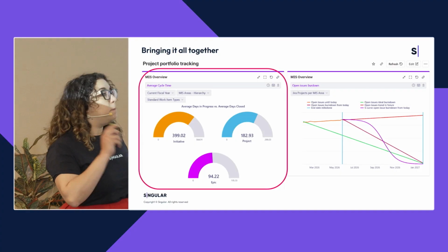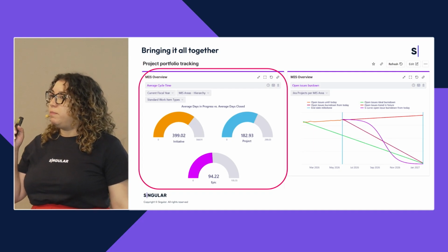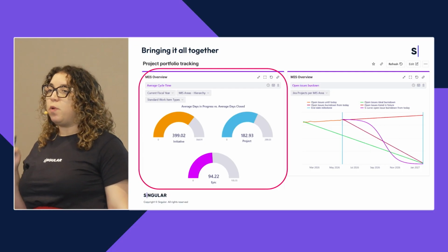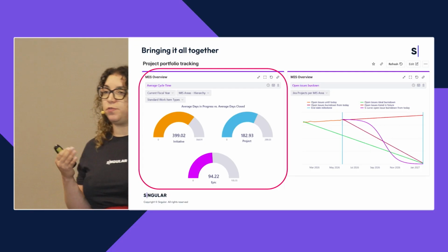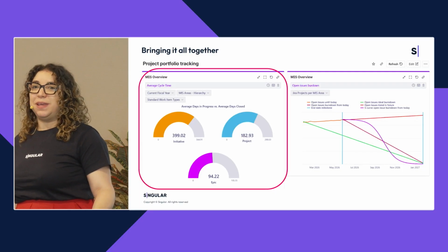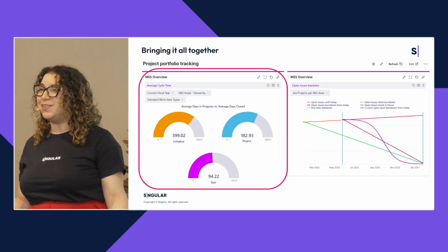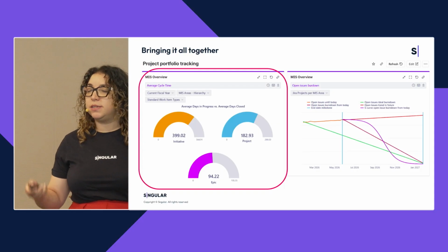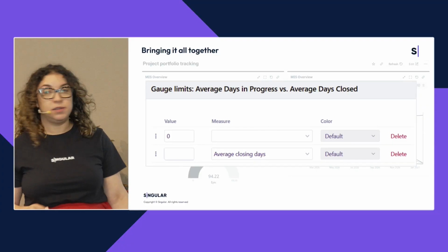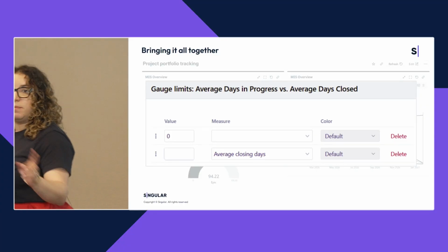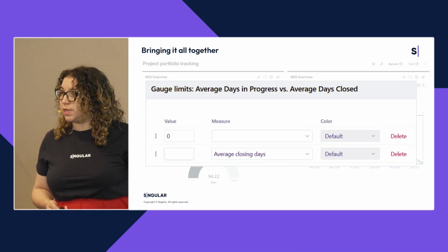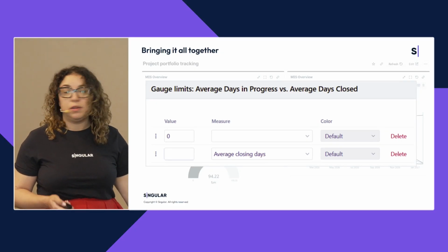And one of the things from Nimble Solutions, they mentioned yesterday, was that one of the big problems that you tend to have, especially for Jira workflows, is that you don't have a resolution date. Because people forget to add a resolution when they close a ticket, right? But we found out eazyBI counts with the average closing date. So with the average closing days and being able to define what statuses count as closing, we were able to set up this report. So that was great.